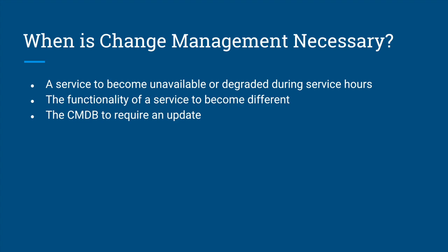One of the questions that comes up because of change management is why do we have to do all this paperwork? So the bigger question is, when is change management necessary? So as it reads here, it's when a service becomes unavailable or degraded during normal service hours. The functionality of a service becomes different. The big picture is that changes that are routine, that involve little risk, they skip the process and become just service tickets and service fixes. Anything that will be high risk or higher risk that requires more planning or thinking, that will go into the change management process.